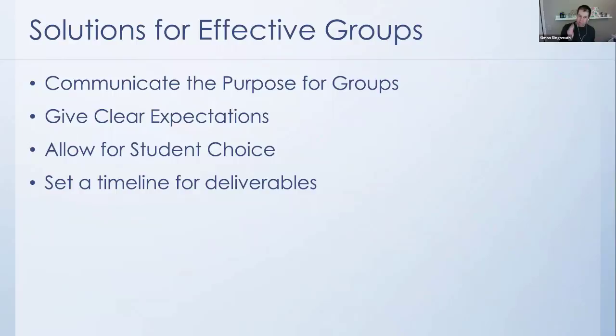So I started setting a specific timeline. After 2 weeks, these are due. 2 more weeks, these are due. 2 more weeks, this is due. Then your presentation. Guiding them along and setting those milestones throughout the project made a ton of difference in terms of the quality of work that they delivered. Don't make everything due all at once.